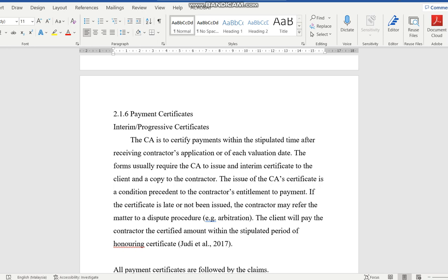Then you've got provisional sum. Provisional sum is basically work quantity that is not confirmed. But the overall contract is confirmed, but some part of the work quantity is not confirmed. So we put it under provisional sum, and that part will be paid according to the work done. You see, the amount of work done. Is it piling, is it pipe, is it whatever, then it's based on the length, based on remeasurement at the end of the day. And this is very similar to what we call prime cost sum as well.